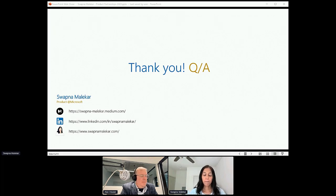If you're asking about who will be involved, it will be the risk, compliance, and privacy partners along with the product team, who will have a better understanding of the product, obviously, right? So they need to work together in order to identify, at a very early stage, all the risks that might happen or might be a part of this ecosystem. Then the product team and business teams will work together to create a risk mitigation plan.